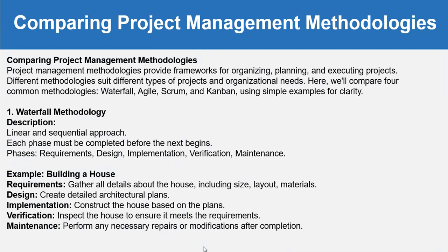For example, building a house. First we gather all details about the house, including size, layout and material, then create a detailed architectural plan, which is the design basically, construct the house based on the plan, then inspect the house to ensure it meets all the requirements, and then perform any necessary repair or modification after completion.